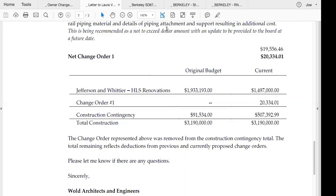And then the last bid to review, we had a bid for relocation moving services to move the furniture out of Riley North Lake, primarily North Lake this summer. There's still a little bit of work at Riley, but primarily at North Lake. We had 2 bidders come in, and one of the bidders, which Dale vetted out, we have a communication that they stand by their bid. So it's significantly lower than the other bid, but that will be presented for bid award during the regular board meeting, along with the bid for signage and blinds. So the board will be asked to take action during the regular meeting.